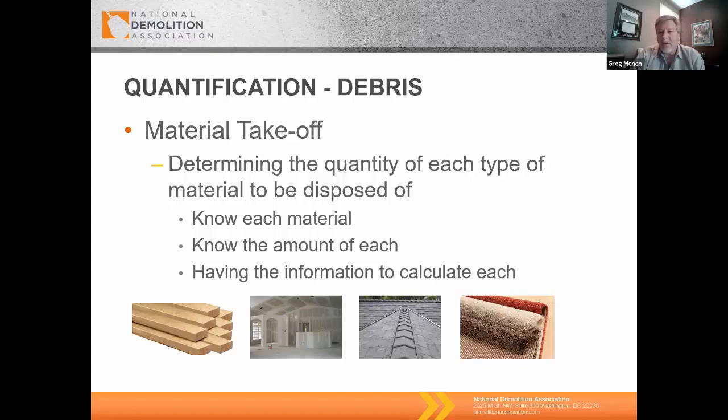And when he sprays all that down and soaks every bit of what you have, and then you turn around and put that in the truck and haul it off to the landfill where you're paying per ton, you can imagine how much additional weight that adds to your truck, which means you have less material that can go in it because of the weight restrictions. And on top of the fact that you're paying for the water as it comes out of the fire hydrant, you're now paying for it at the landfill because you put somebody on there who doesn't fully understand how to control your water and control your dust.